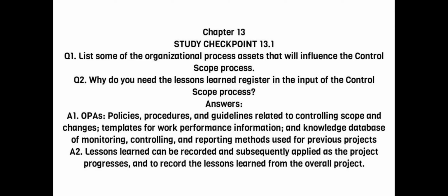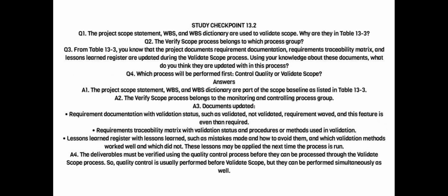Answers. A1. OPAs, policies, procedures, and guidelines related to controlling scope and changes, templates for work performance information, and knowledge database of monitoring, controlling, and reporting methods used for previous projects. A2. Lessons learned can be recorded and subsequently applied as the project progresses, and to record the lessons learned from the overall project. Study Checkpoint 13.2.